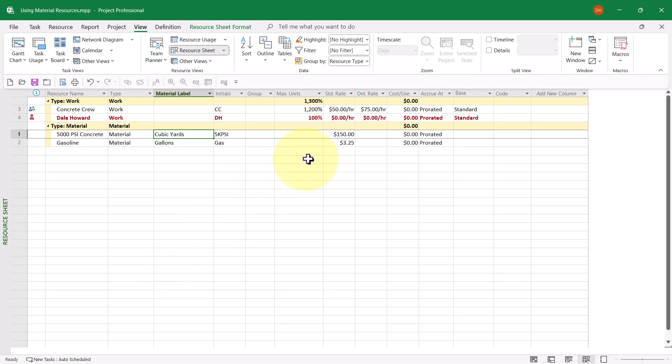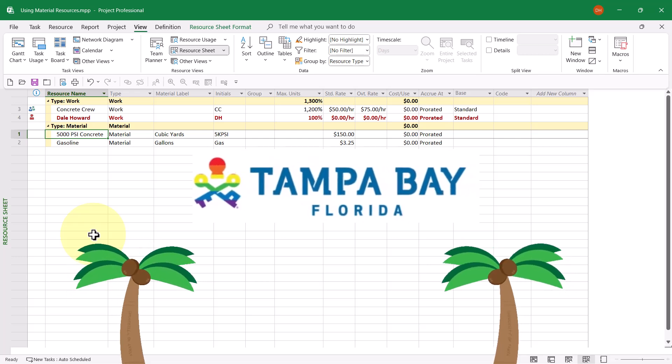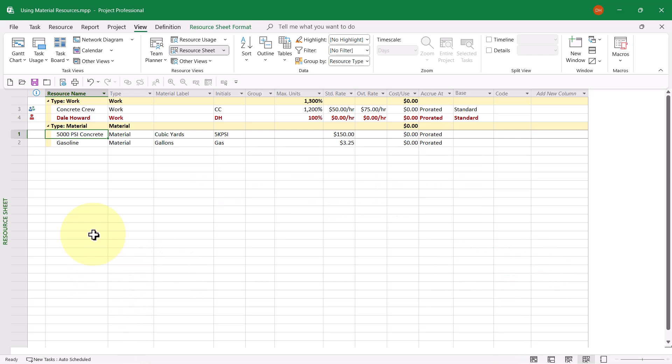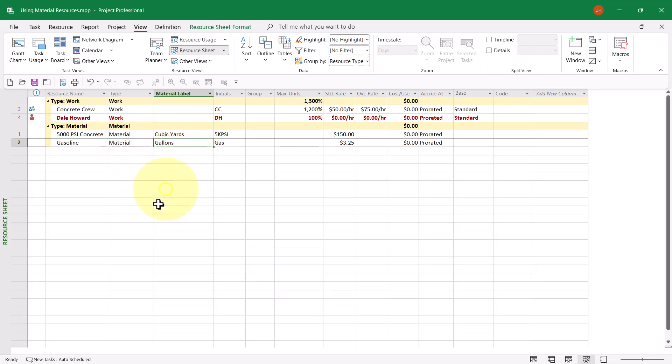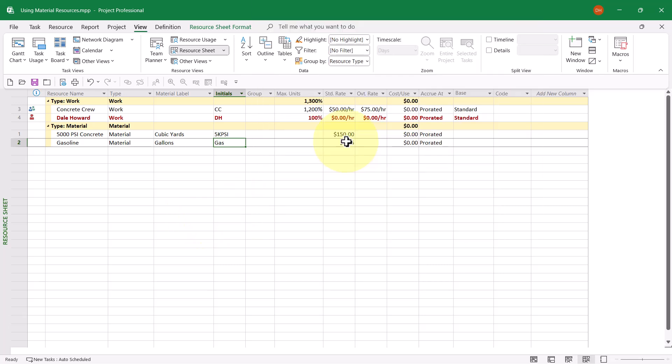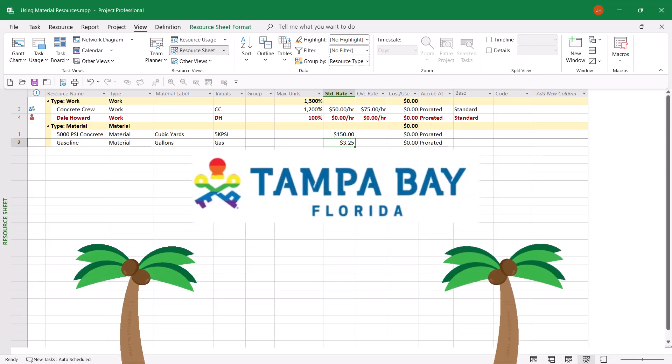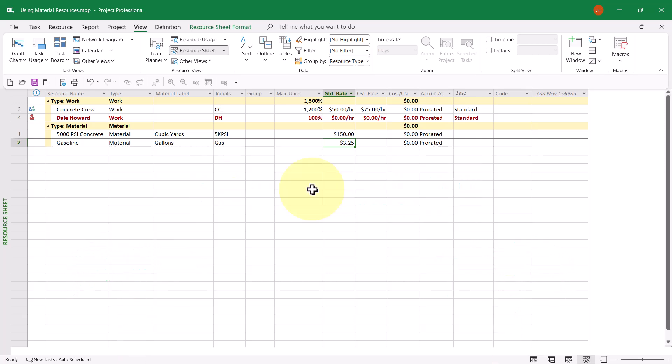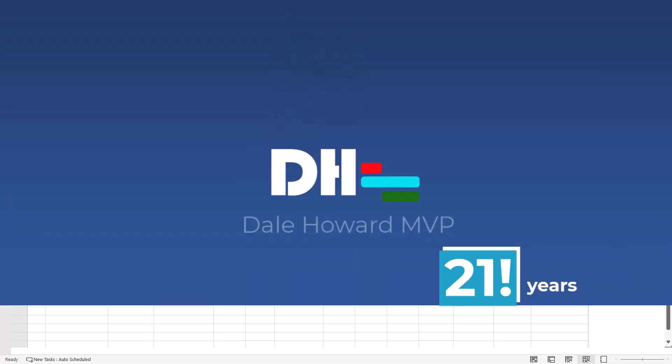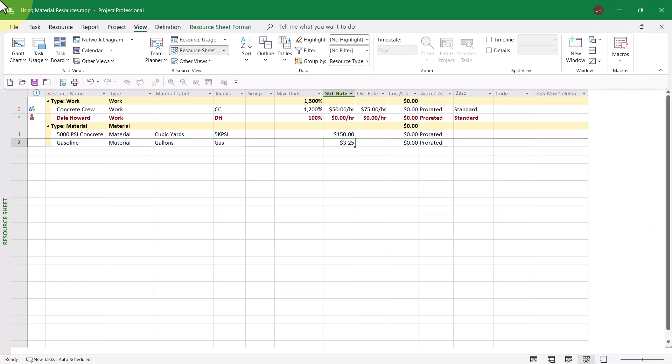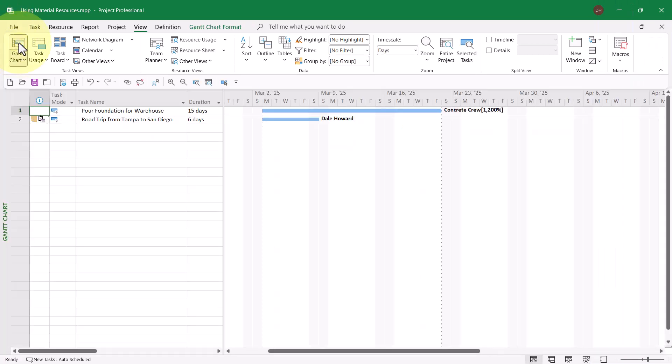By the way, as an aside, $150 is actually the current cost for 5,000 PSI concrete here in the Tampa Bay area of Florida at the time I'm recording this video. Notice I have a second material resource named gasoline. The type is set to Material. The Material Label this time is Gallons. Notice I put a really clever set of initials in for gasoline. At the time I'm recording this video, the price of a gallon of gasoline here in the Tampa Bay area, on average, is about $3.25 per gallon. Now let's talk about the proper way to assign material resources to tasks in Microsoft Project.